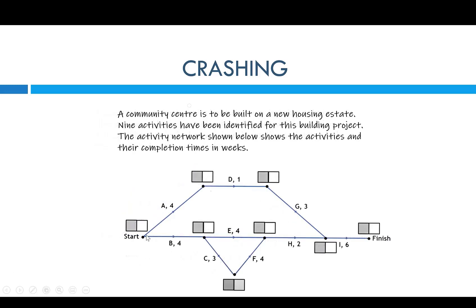Go and put your boxes for LST and EST — your earlier start time and your later start time. We'll start off with the grey boxes, which is our forward scanning from start to finish. We're going to start here at zero and go up.